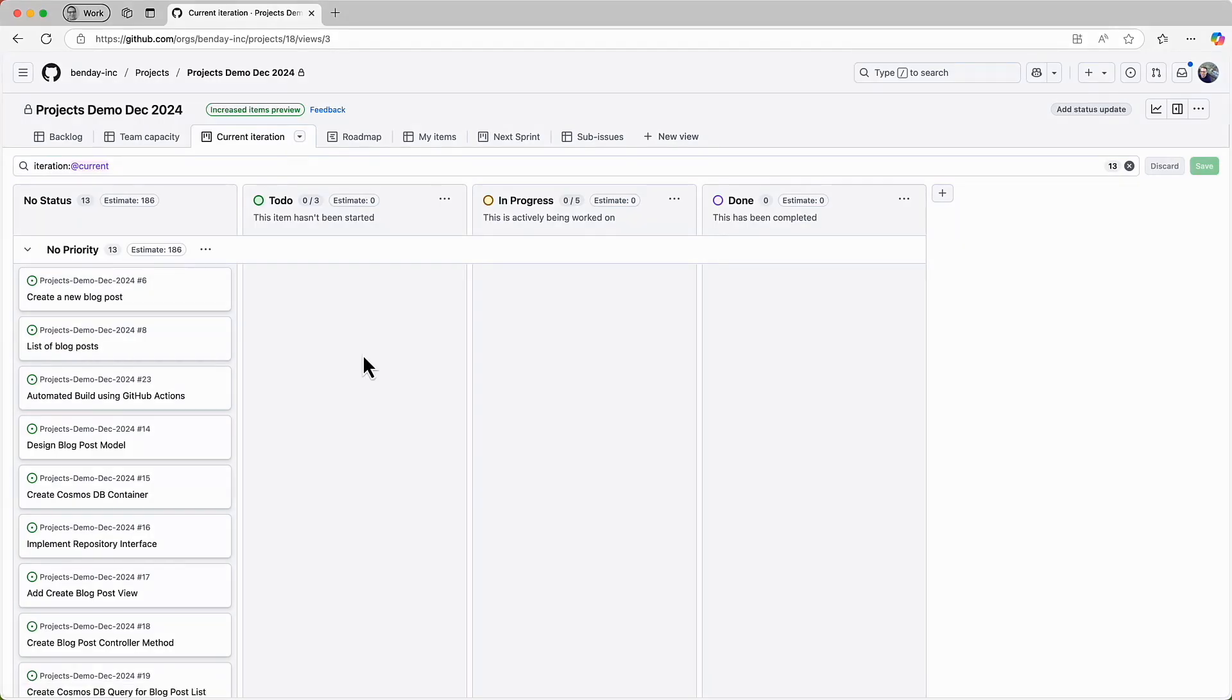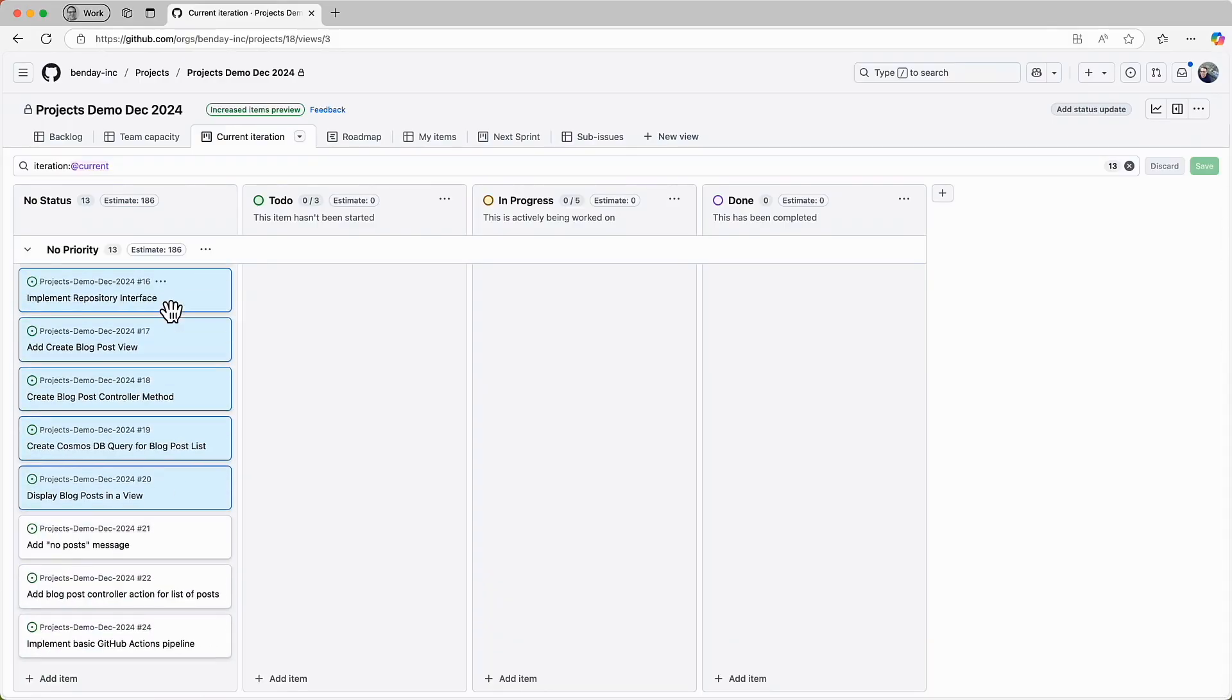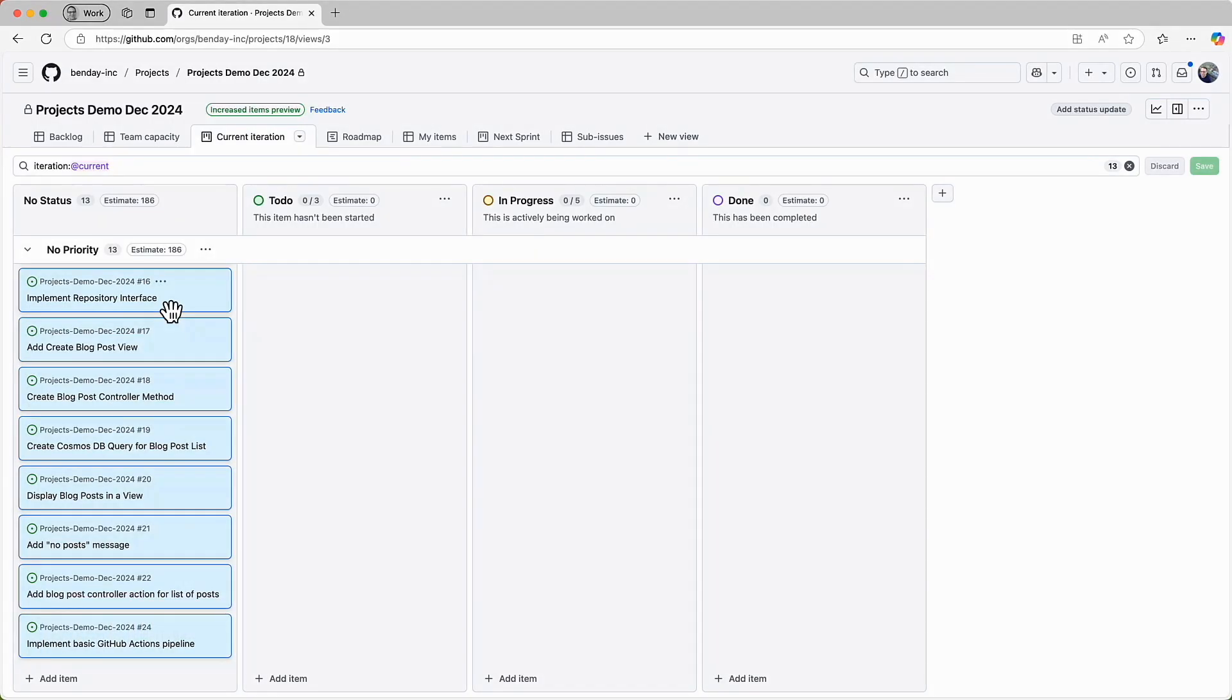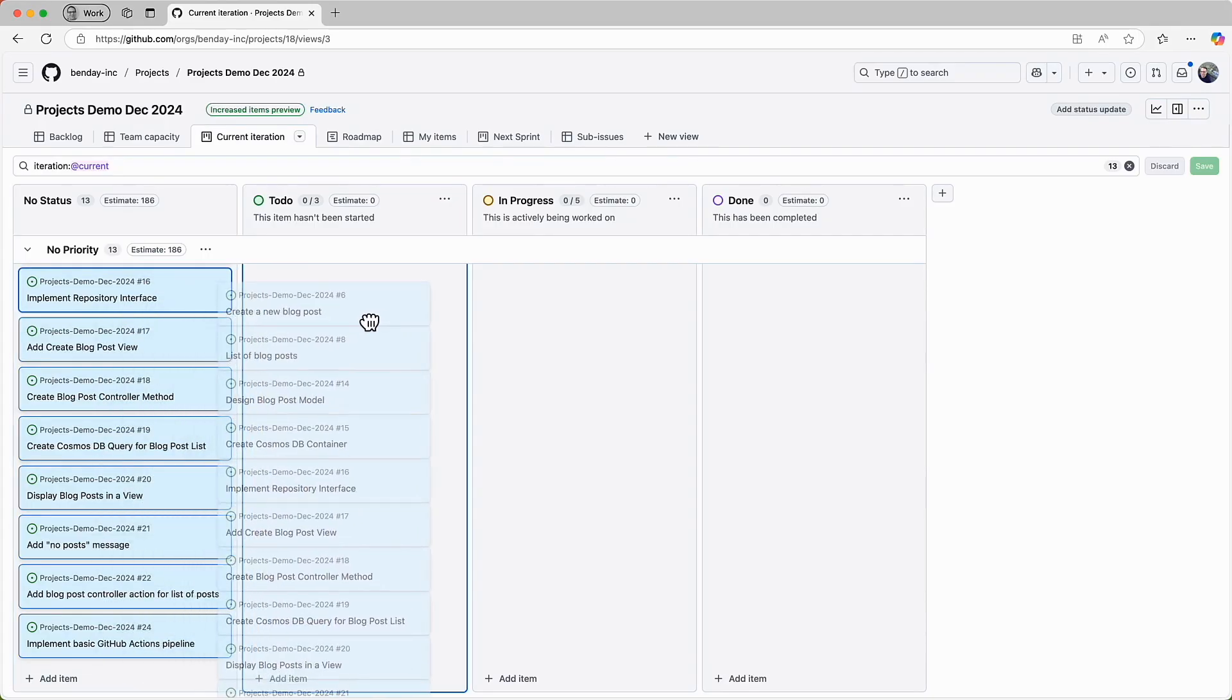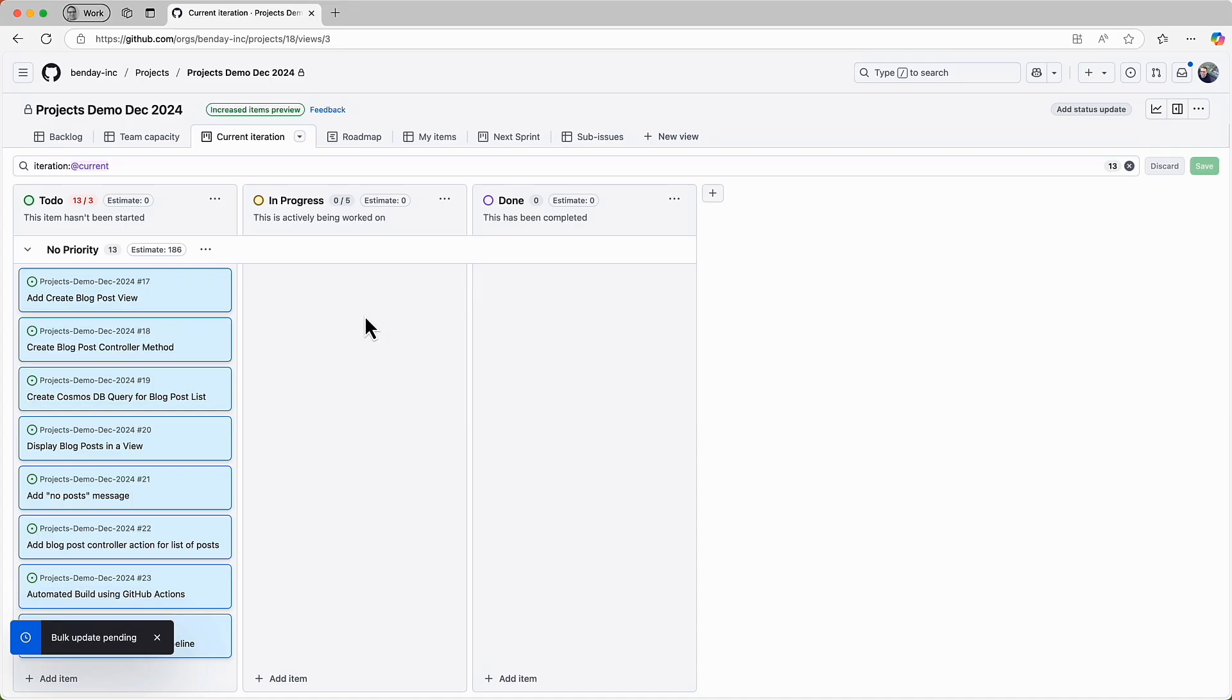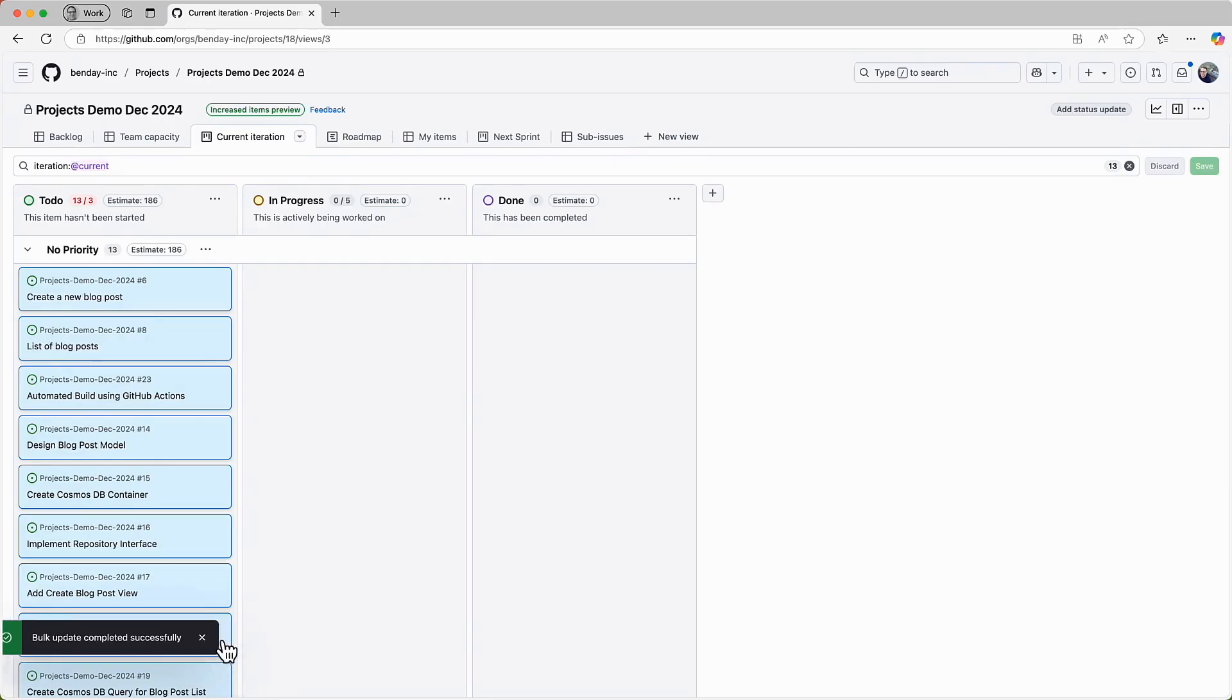To do that, we could come over to each of the items in the no status column and move them individually. But since I need to change the status on all of them, I'll click the first one and then use the keyboard to select the entire list. In this case, on Windows and on Mac, what I'm doing is using the shift key and the down arrow key, and then just click the selected items and drag it from the no status column to the to do column. That'll change the status and give you a little message indicating that it's running a bulk update. The no status column disappears and you see the message that says bulk update completed successfully. You'll probably only need to do that bulk status assignment one time per sprint.